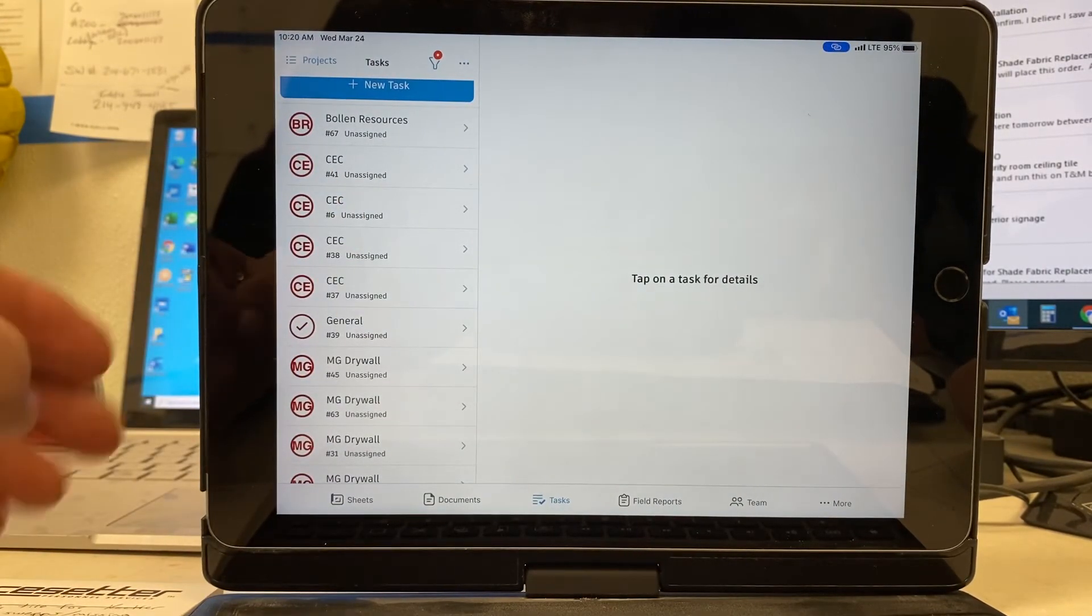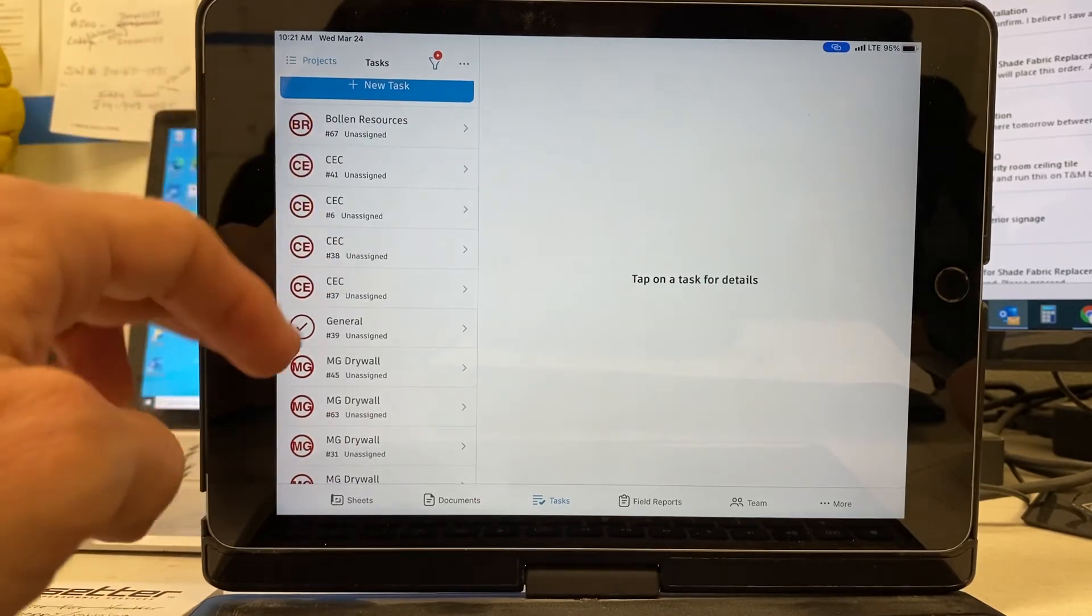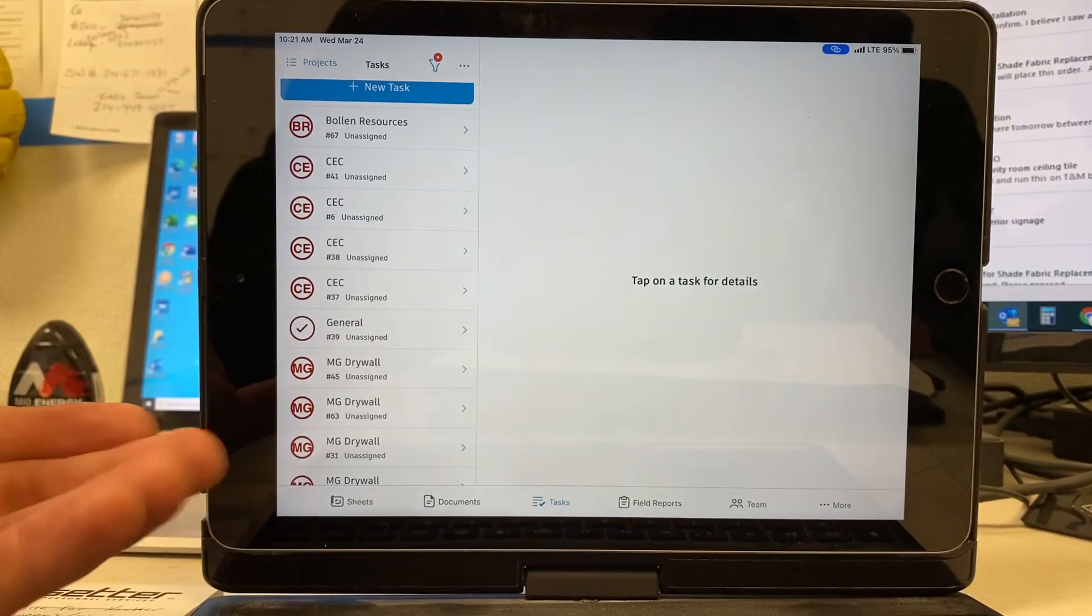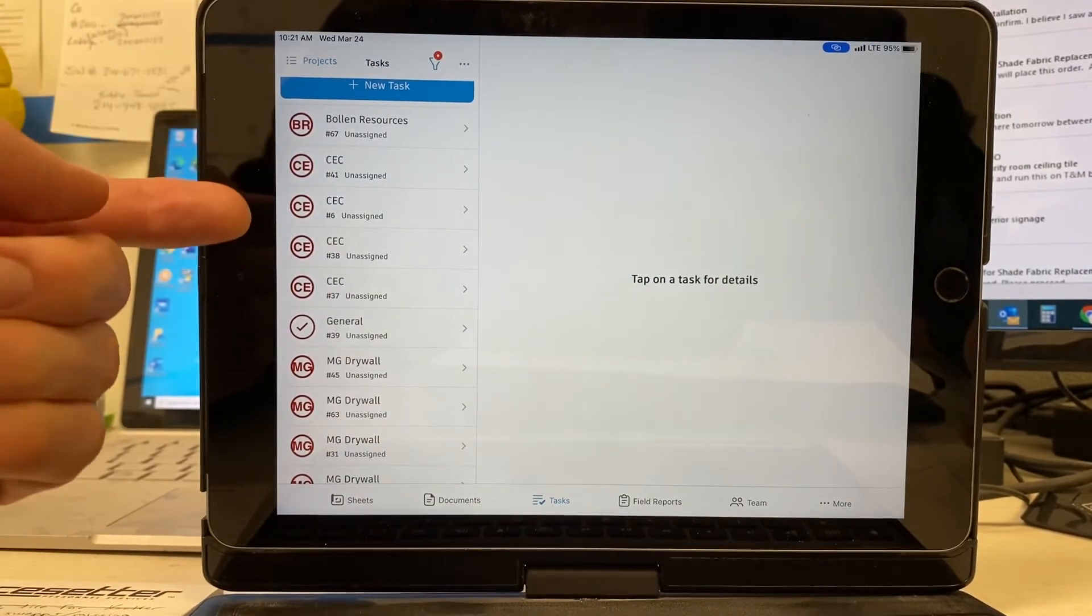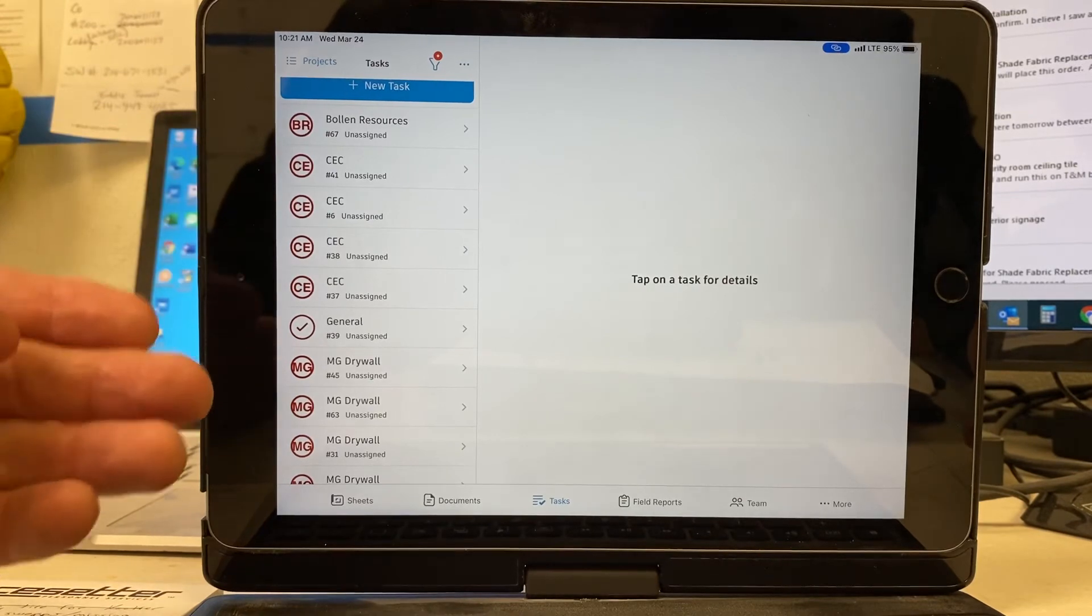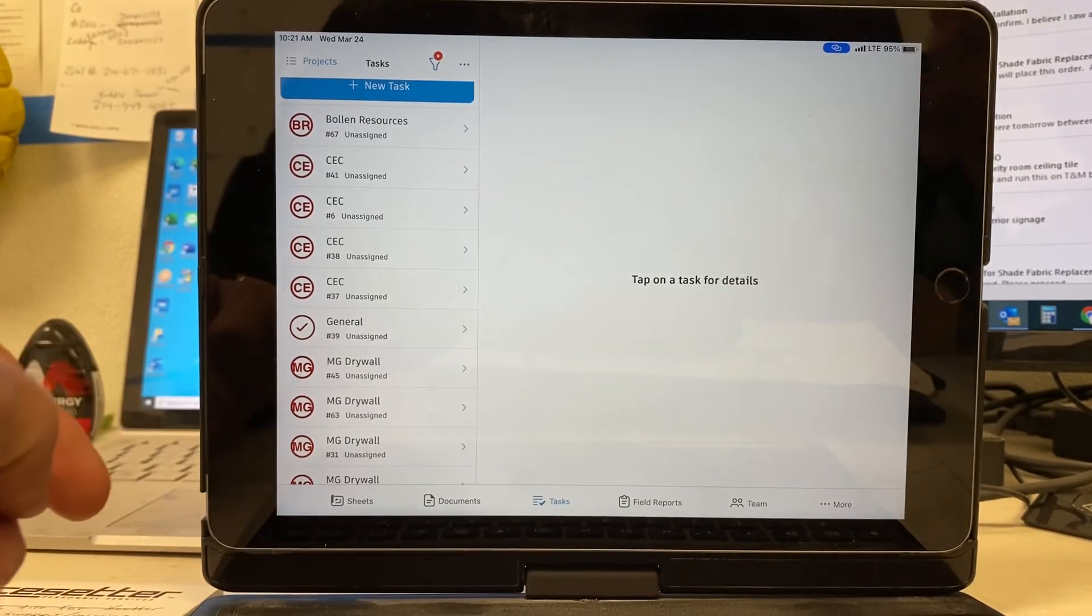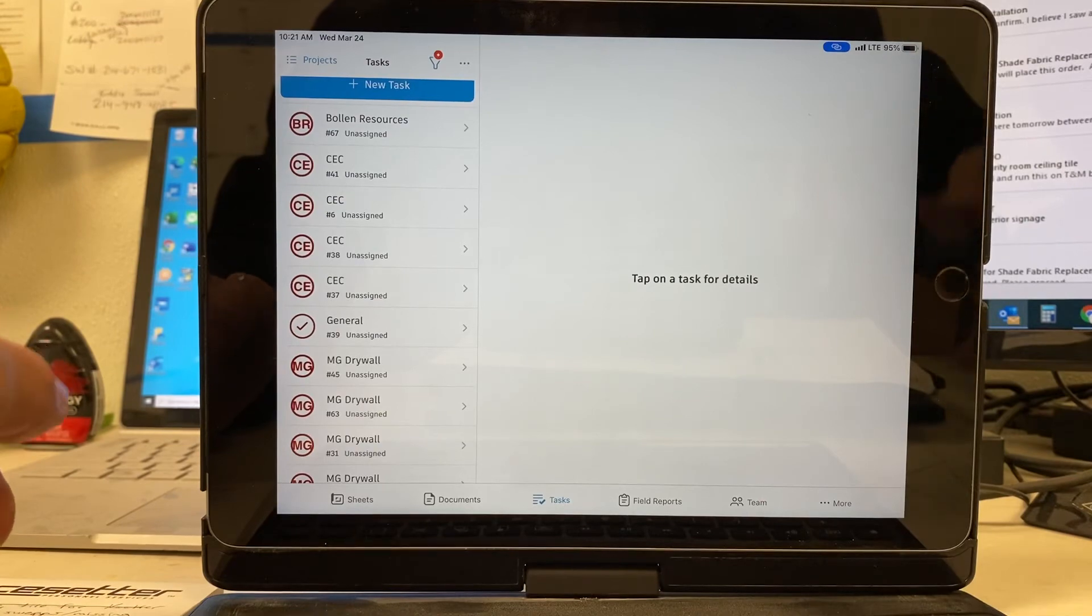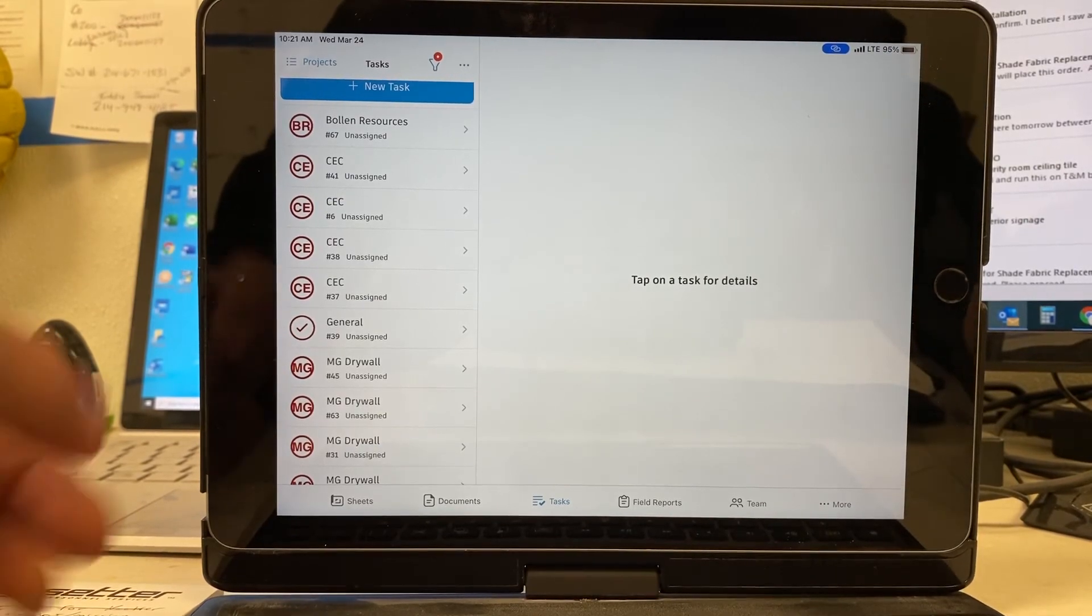What's going to be the difference here is whenever I send this link, it is going to show all of these items in numerical order on how I put them on the plans. So it'll show the subs out of order. So when the subs are looking for their items, they're going to go through and they're going to have to go, Okay, I've got one on page one, one on page seven, one on page 13. So they've got to go through there and individually find all of their stuff.